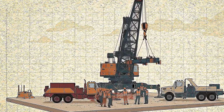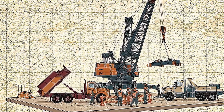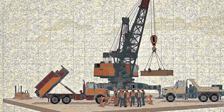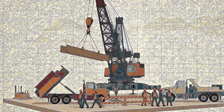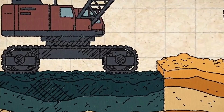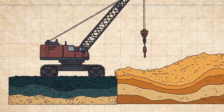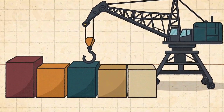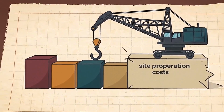Federal highway guidance treats hauling and transport-related assembly and disassembly as part of mobilization in the context it governs. Rental companies also routinely distinguish the crane rate from other charges such as mobilization, permits, fuel, or rigging, depending on the contract, which means money can start moving before the hook does. And once you see that, the next question becomes unavoidable. When someone tells you what the crane costs per hour, are they telling you the price of the job, or only the easiest number to see?